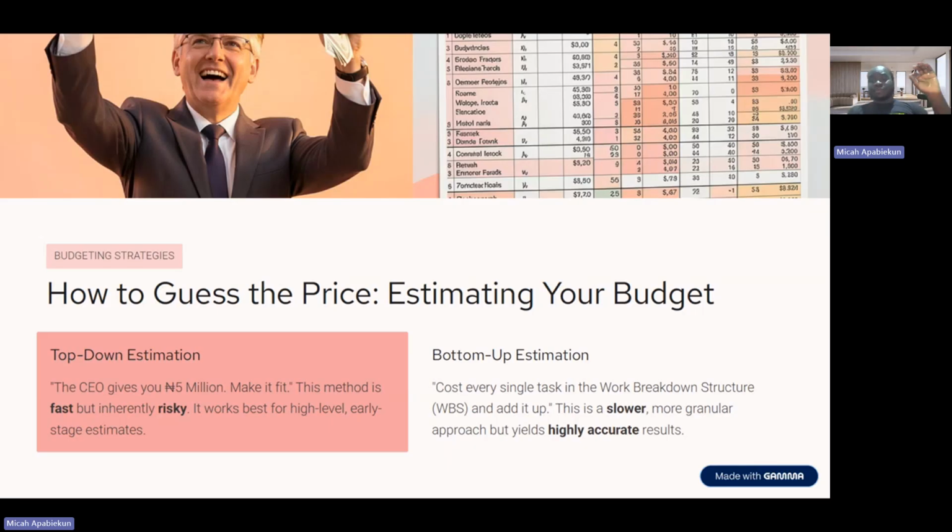However, we'll retain the scope the way it is, but we'll need to deliver it in 2 or 3 months. So that means I'm going to lower the workload of my staff, or I'm not going to get as many people on it. If I was planning to get 20 people on the project so we can achieve it quickly, I'll now get 10 people that will work for 3 months. So you get, with the same amount. Do you understand? Okay. So that's important.